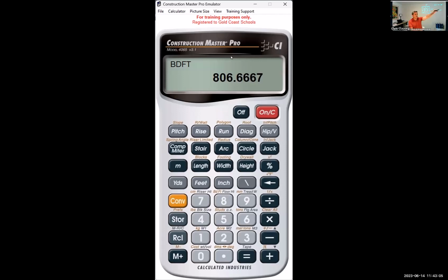We're not worrying about this third dimension yet. We're just going to do the face area and then multiply whatever that number is times the height. At 1 square feet of face area, we have to back out the area of the circle. So if we go back to our calculator, we've got 6 inches as the diameter. So it's perfect, and we just go to circle.